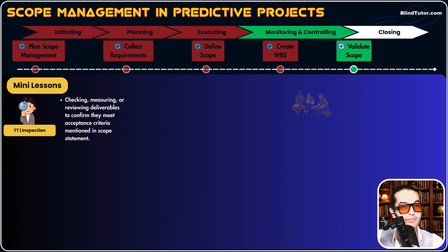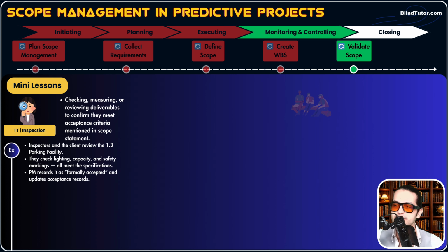Then we go to step 4 of inspection, which is a time for the PM to write down if deliverables are accepted or conditionally accepted or rejected. Why do deliverables become rejected? When a deliverable does not meet our acceptance criteria. The client rejects it, and you need to rework, replan that deliverable. Why conditionally accepted? There are minor issues with the deliverable. With minor fixes, that deliverable will become accepted. That's why it is conditionally accepted right now. Okay, so this is exactly how inspection works.